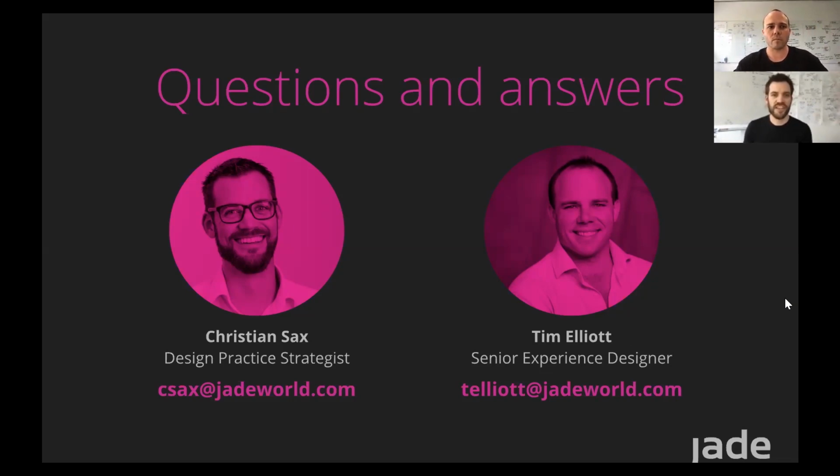I got one question here. Can it be shorter, like 3 days? Yes, it can be. There are two modes. If you think of the 5 days, the most intense parts, where we need you for almost a full day, are Monday to Wednesday. If you can only make people available for that, that's good enough, because Thursday and Friday is mainly run by us, as we create the prototypes and do the testing. And because we stream the testing, you don't necessarily have to be in the observation room. You could be at your desk as well if you have a busy week.